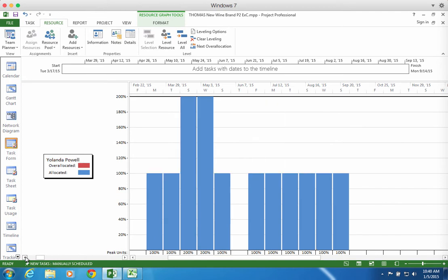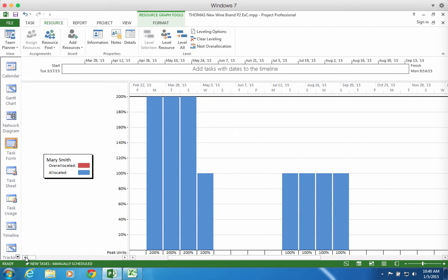As a project manager, having this kind of information right now allows me to look at my sourcing and see, have I got the ability to get people to cover those times? Are there some phantom hours in here that we really don't have, as much work as we said, 2 weeks, but really that's only part-time during those weeks? We really can do these tasks together. I would have discussions with my employees and see if we could actually get this done right now at this allocation level.